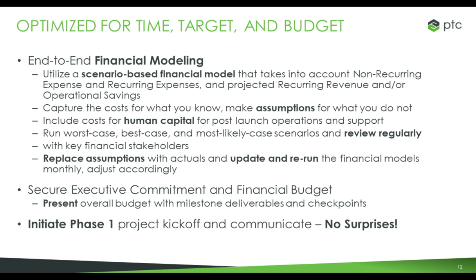So in order to do this, I need to go back to my financial stakeholders and say, the additional features and functions you added are going to add this much to our cost. For us to continue 3 months from now, I'm going to need additional funding added to the budget.